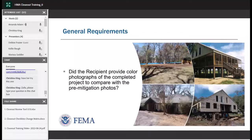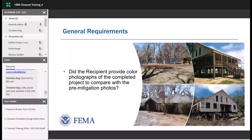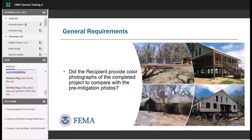With the inspection report we also see photographs of the completed project. We've added the word 'color' to our new checklist — photographs must be in color as they are difficult to see in black and white. You can submit photos with the inspection report or elsewhere in the closeout package. If not included in the inspection report, photos should be labeled with the project number, address, and latitude and longitude coordinates. We use these to verify the scope of work was complete and compare them with pre-mitigation photos from the application.